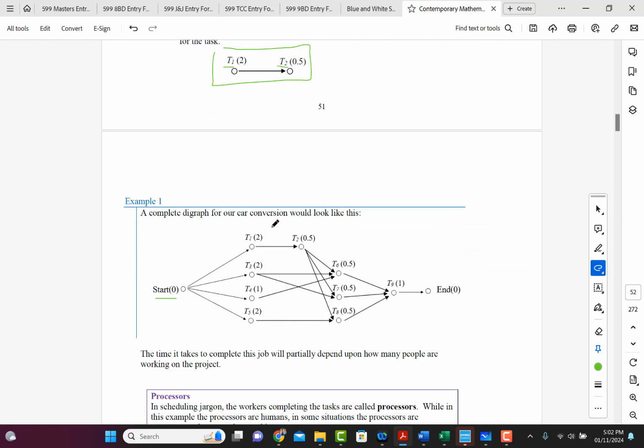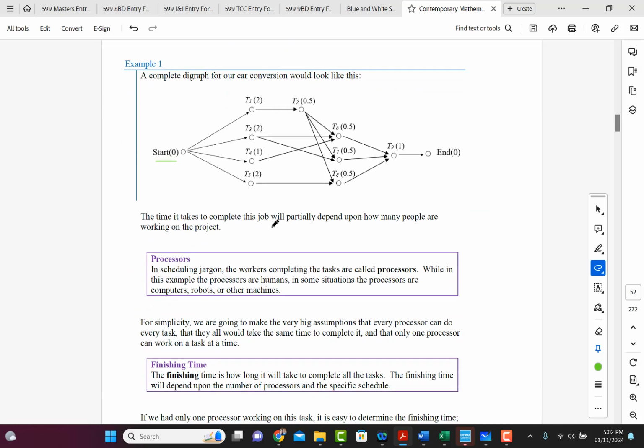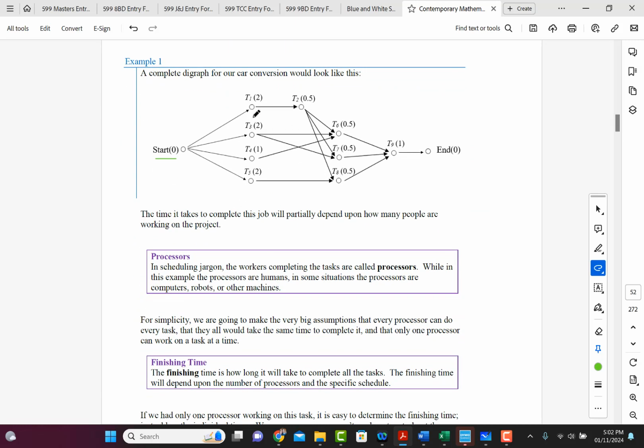They're going to take up different amounts of time to do that, right? So they're going to finish in different times, but they can all be started at the same time. So tasks 1, 3, 4, and 5 are all done here. Okay, now, once task 1 is done, task 2 can be completed.